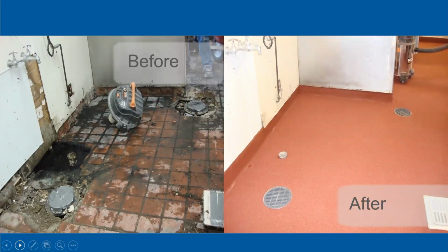If you broadcast a decorative flake and decorative quartz on top of those urethane cements, and they're usually 1/4 inch systems, you're going to push up into probably $10 to $12 range. Those life cycles are 25 plus years, typically what we're going to see.